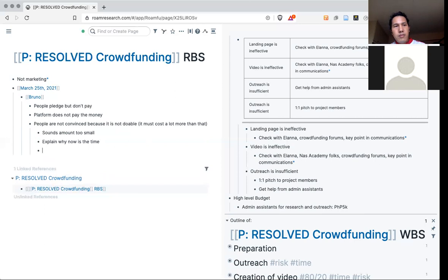It means you will have failed the whole project because of the risk of the sequencing itself. So maybe you should raise a little bit more to be sure that you can do maybe 2 sequencing runs. If one fails, the other works. Yeah, maybe.